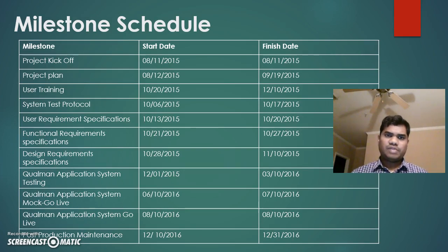And when it comes to the milestone schedule, today is the kickoff meeting, that is 8/11, and the URS document will be ready by October 28, 2015, and the FRS document will be ready by October 27, 2015, and the live date for this project is on August 10, 2016.